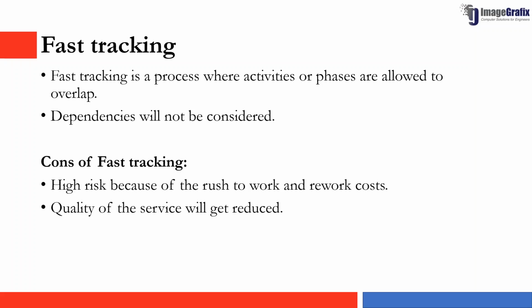And the second one is that the quality of the service is getting reduced because of the reworks. The quality of the service which we are going to provide is also getting reduced. So these are the two considerations which we need to see when fast tracking the schedule.